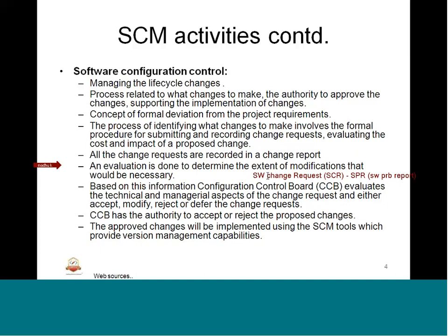So once an SCR is prepared, or all the change requests are recorded in the bug, an evaluation is done to determine the extent of modifications that would be necessary. Based on this information, the CCB, or change control board, evaluates the technical and managerial aspects of the change request, and either they accept, modify, reject, or defer it. The CCB has the full authority to accept or reject.